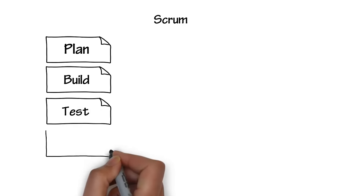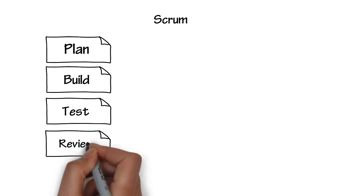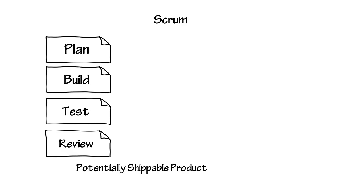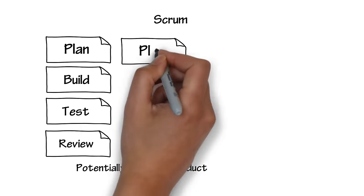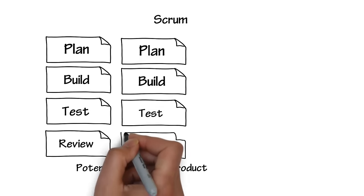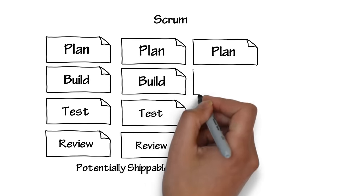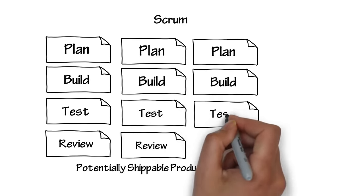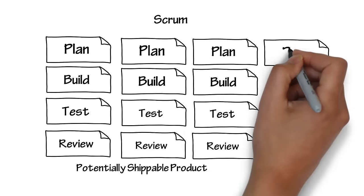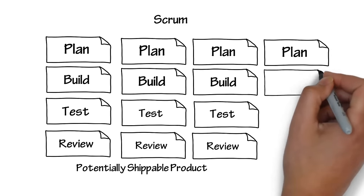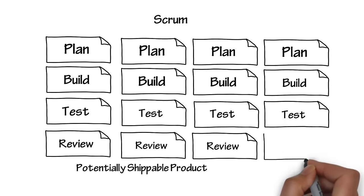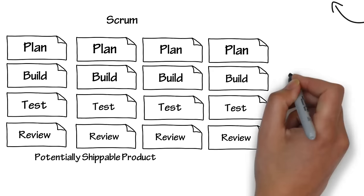When that cycle is complete, we end up with a potentially shippable product. This process usually occurs in a time period of one to three weeks. This is then repeated time and time again, reducing the time from planning to development to testing. Each time through the planning process, we're doing just enough planning to complete the next incremental release.